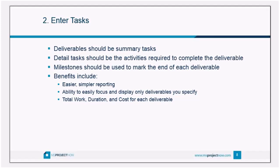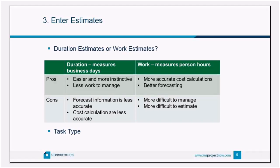Having milestones also makes your reporting easier. Depending on your schedule size, you could create a quick high-level one-page report showing your milestones and when they'll finish, and even track variances. It also calculates the total work, total duration, and total cost for each deliverable — so you can see by deliverable how much it will cost and how much effort is required. This is important information if you need to reduce scope to meet a hard deadline.